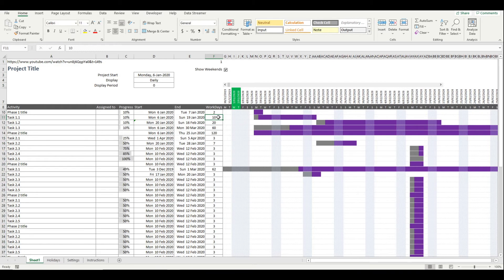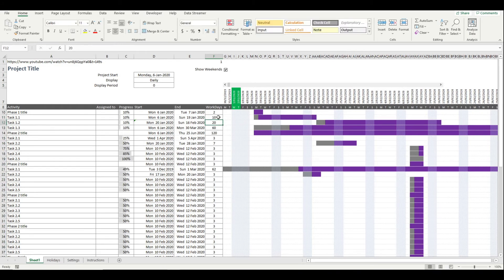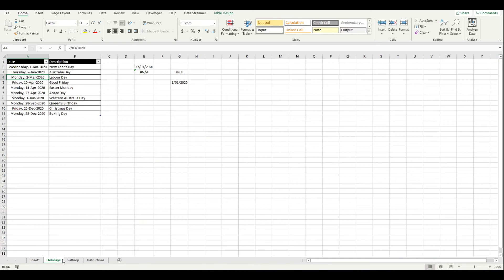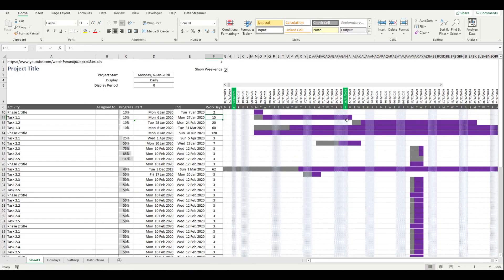If you adjust the days you'll notice that it will even take into account the weekends. You don't have to do anything extra, it just does that for you, and the same with holidays—it will jump over the holidays if you adjust to include them. So now on the 26th of January there we are. Now if I change this holiday here to be the 26th of Jan, it's taken into account and pushed things out an extra day.